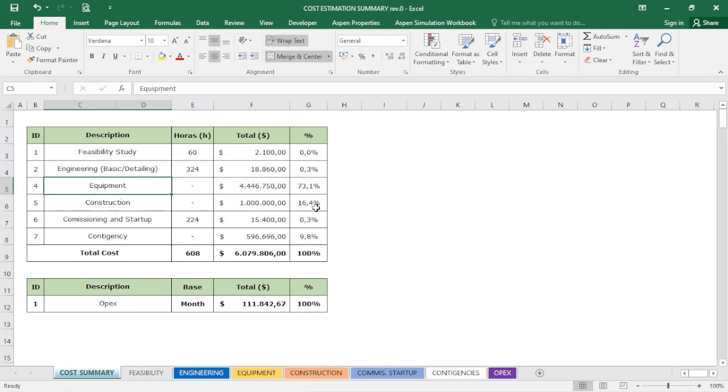The second major cost will be installation, because I will need to do civil engineering, electrical engineering, mechanical, instrumentation, automation. I will need multiple persons, or many people, to do this. So the calculations performed give us as reference 16.4% of the total cost.